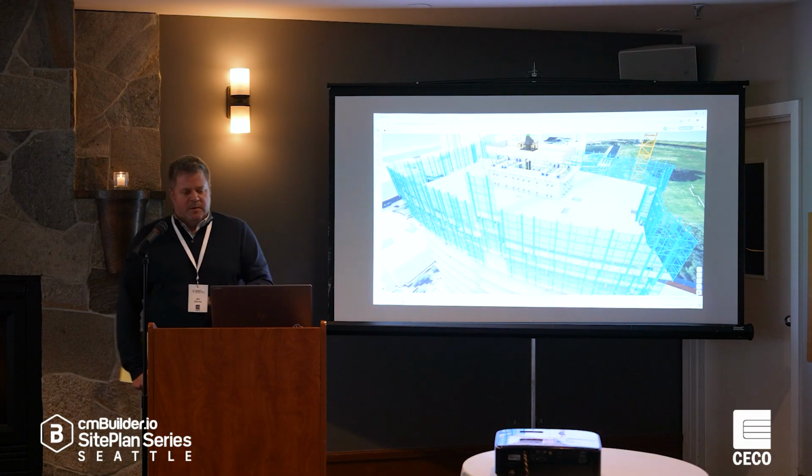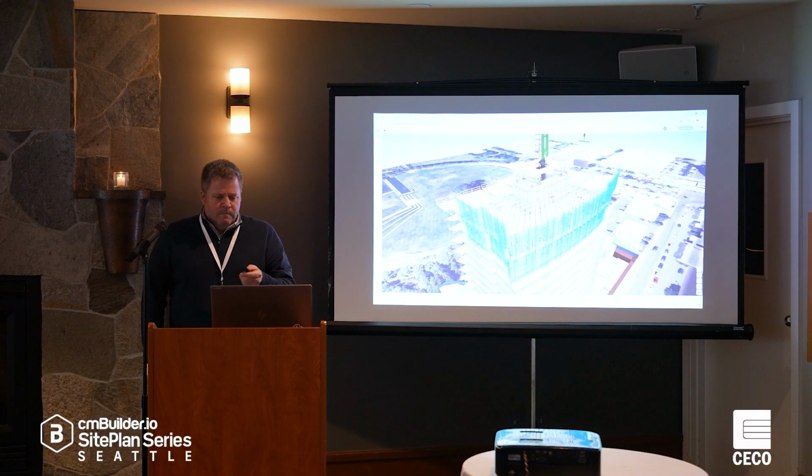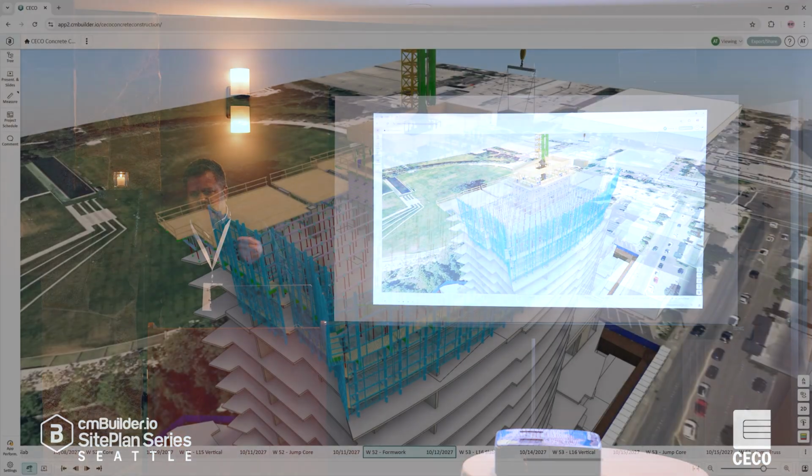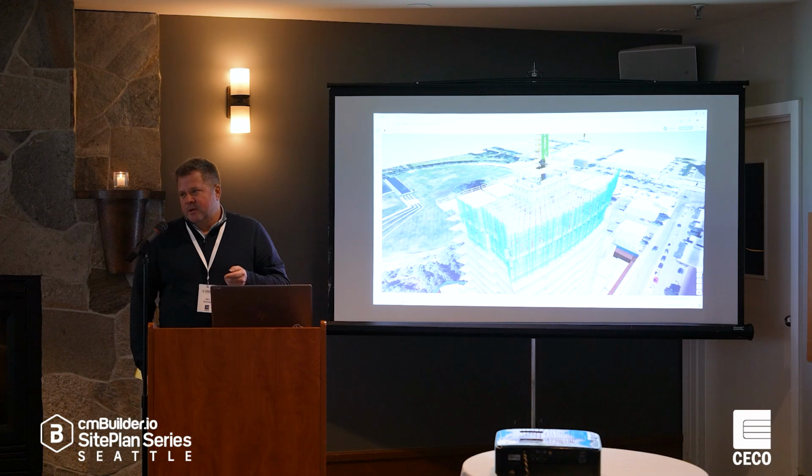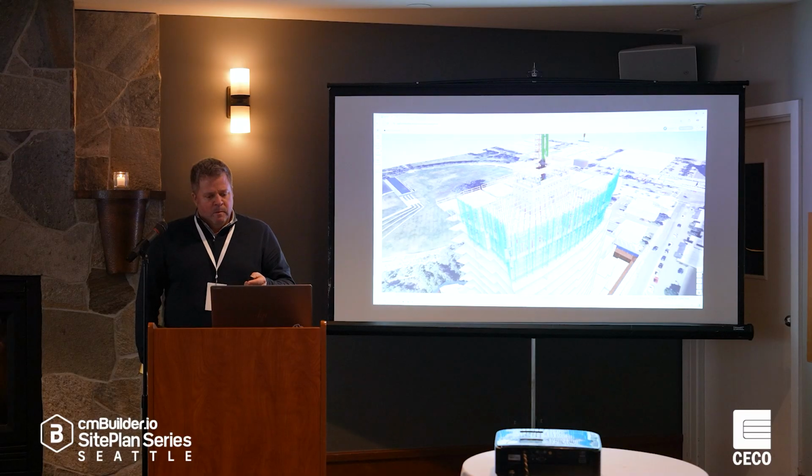Right, that's what we're talking about. One of the cool things that happened is, if we get to build it, I think Bellevue's about to go, but we ended up coming up with a hybrid solution that lets us pay the premium where Bellevue Way is impacted, on the backside of the site where it doesn't matter so much. Let's not maximize cost versus benefit type stuff.